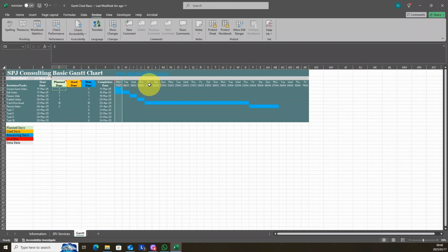So let's go into the future, and I'm now saying I've got my data date on the 21st. I want to see where I'm tracking. And let's say by that date I've used 1 day as per plan. I've actually used 3 days here, and I'm -1. Now in this case you could decide, do I need to review my start date of my following activity after spending an additional day editing video, because I'm not too great at editing videos.